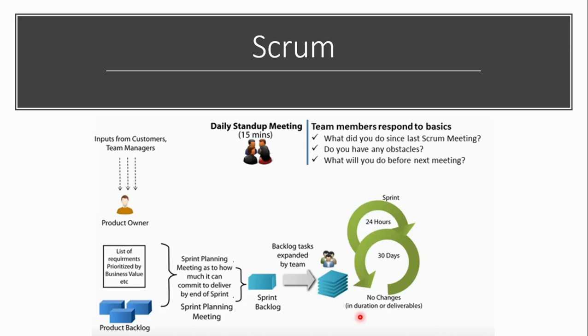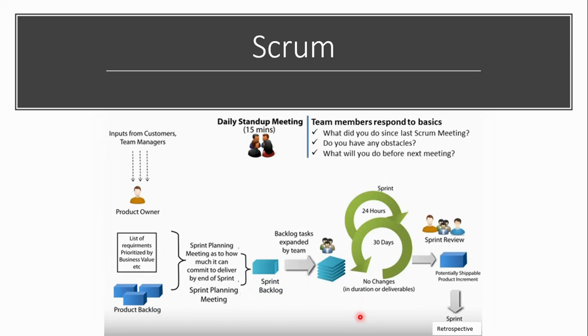Just a 10 or 15 minute meeting, standing up, to recap what you did yesterday, any obstacles that you faced yesterday, and any things that the Scrum Master or the project manager has to sort out, and to recap the sprint backlog. So it's just a stand-up meeting to get the progress.